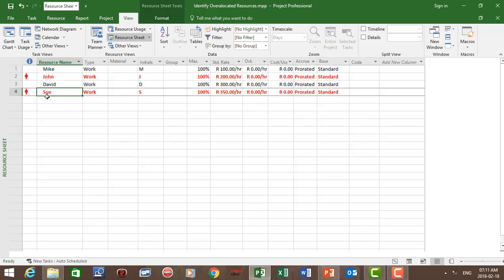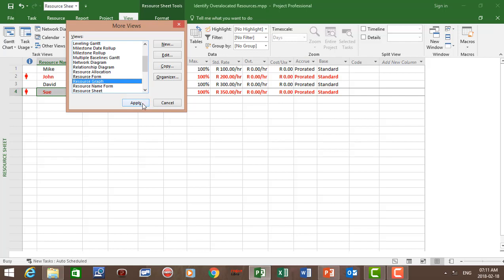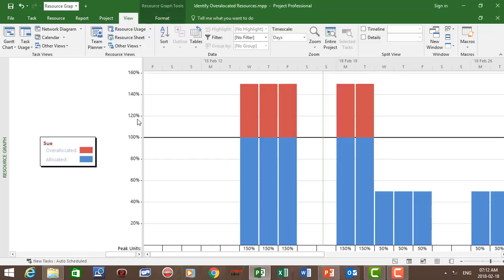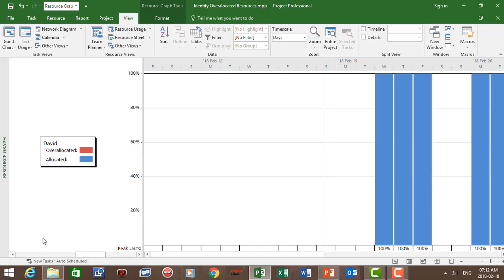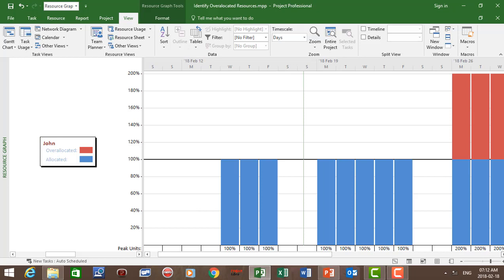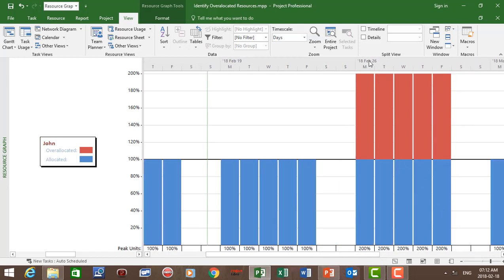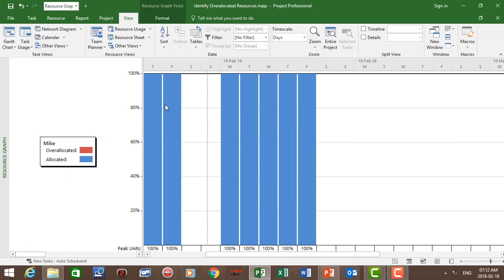Our next view is the resource graph. Let's click on other views, then more views, and select resource graph. On the resource graph we have the resource name on the left, and on the right we have the time scale and the resource allocation percentage. We can see Sue is allocated 150% of her time, therefore a 50% over-allocation. David has 100% allocation so there's no over-allocation. For John, there is an over-allocation of 100% for the week of the 26th of February. And for Mike there is no over-allocation.